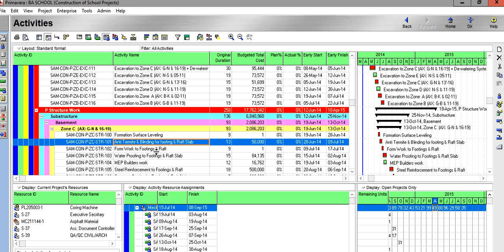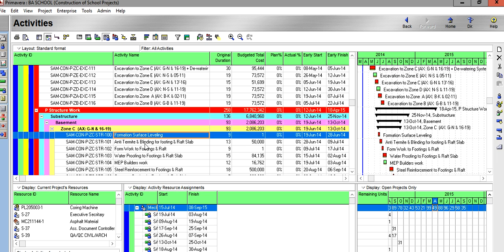So during the finalization of the estimate, we have to prepare a detailed program to incorporate and finalize the estimate. So it is necessary that the finalization of the BOQ, cost rate, and costing shall be linked to the Primavera so that we will find